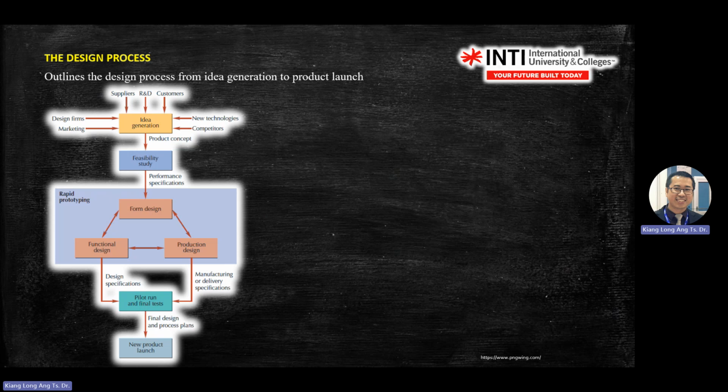Customers are the ones that give you the requirement. So you go back to the customers and you confirm what they really want. For example, your water rocket projects. The customer side only gives you two requirements. One is to launch from one side of the basketball court to the other side. And you should be able to adjust accordingly, either by pressure, amount of water, or angle, according to the range defined by the customers. Okay, so this will be your objective, your project objective.